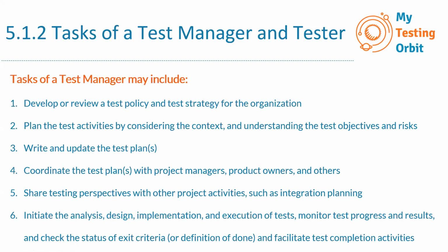Or sometimes for different test levels, like component, integration, system, acceptance, we can have a separate test plan for each, which is known as the level test plan. So in point number 5, it's assumed that there is a level test plan for the integration level, and over here they share the testing perspectives with other project activities.